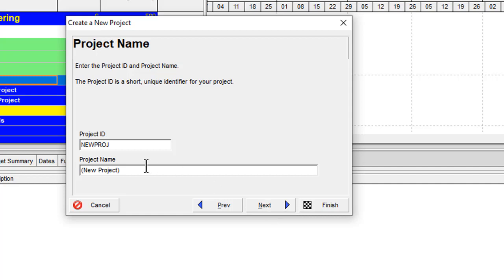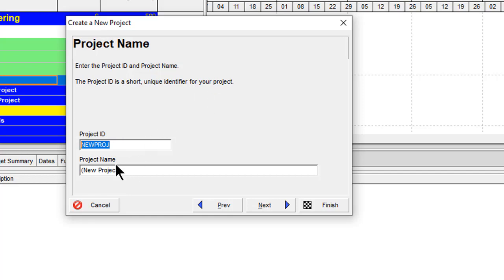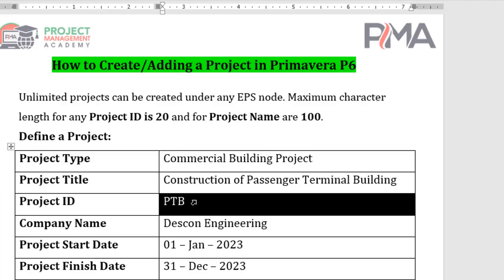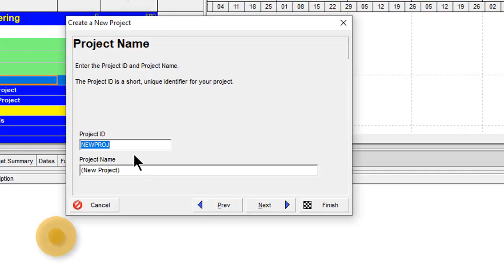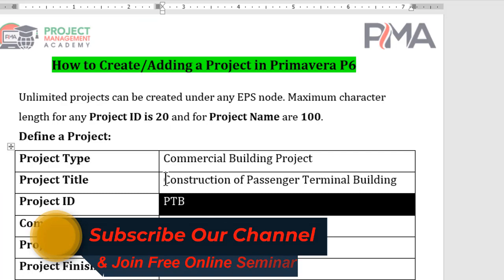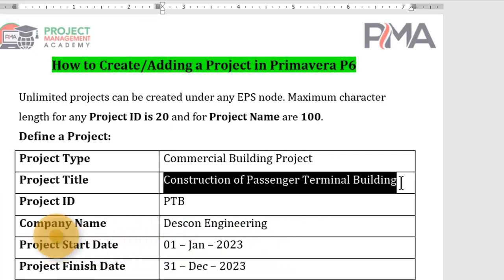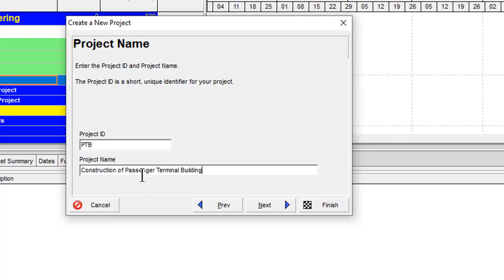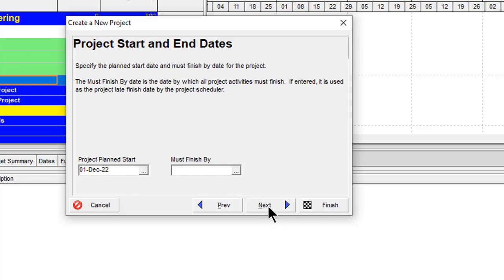Click Next. Now you need to enter the project ID and project name. The project ID is a short, unique identifier for your project — let me add 'PTB' for Passenger Terminal Building. For the project name, I'll copy 'Construction of Passenger Terminal Building' from the Word file and paste it here. Then click Next.